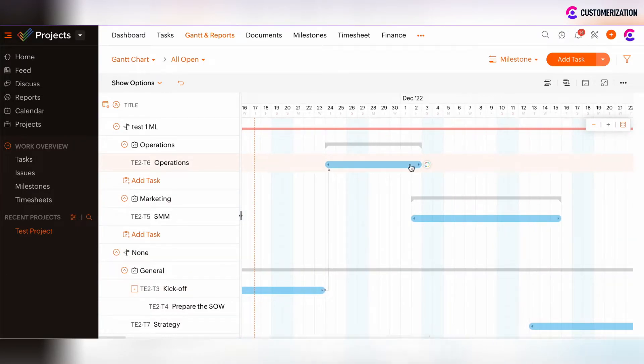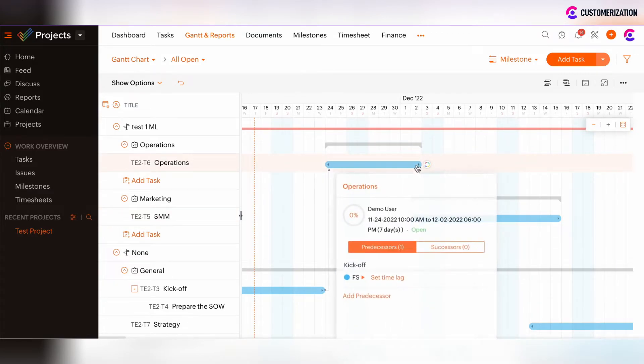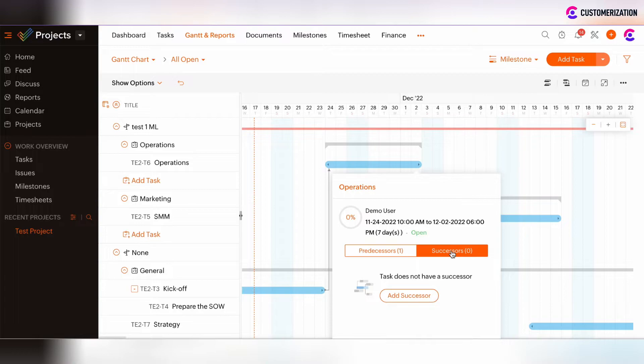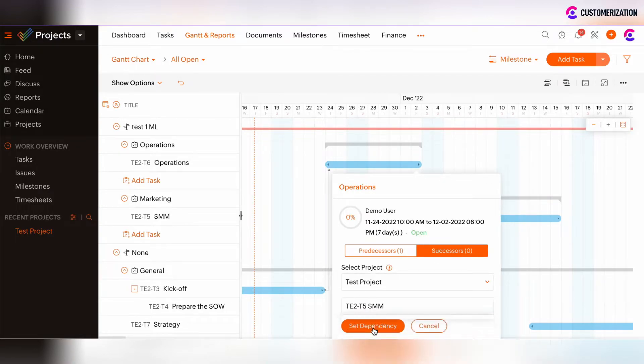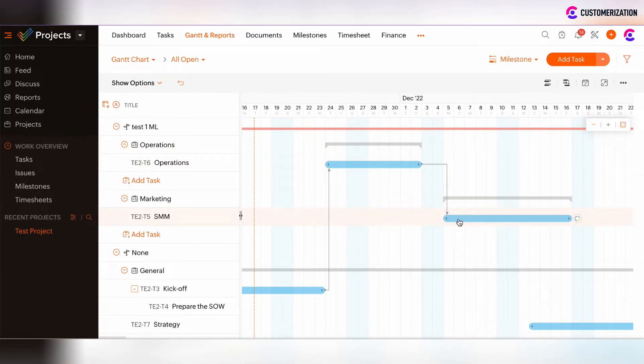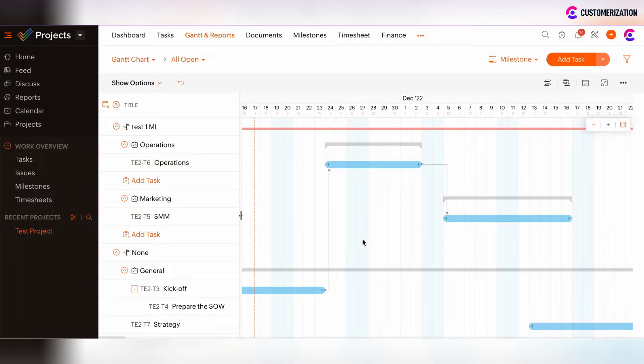Then to set the dependencies between operations and SMM, click on the arrow at the end of the operation task and set successor. Add successor and there are the same actions which we've done before. Set dependency. And now as you see, the SMM task was a little bit moved further and there is the time lag set between the operations and SMM task.